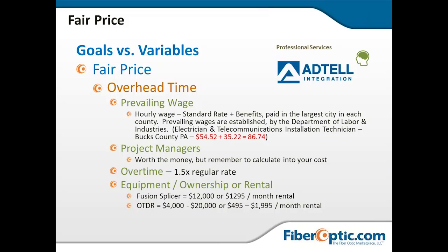Know if it's a prevailing wage job. Know that you're going to have to document that it actually was received all the way to the end technician, that that's what he was paid. Otherwise, you're not going to get paid for the project.